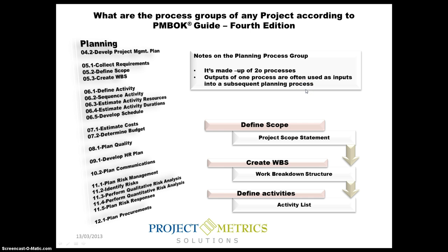What does that mean? When you define the scope, the output is a project scope statement. You are going to use the project scope statement as input when you create the work breakdown structure. And the output of creating the work breakdown structure, you are going to use to define activities when you are talking about the schedule.